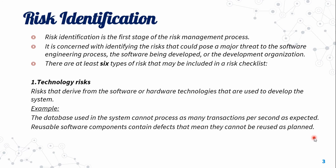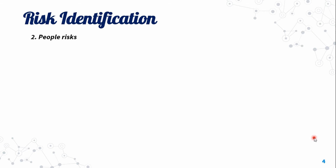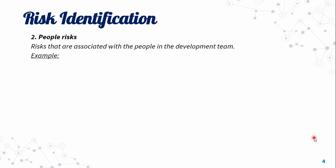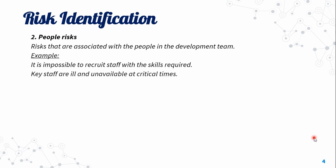Another technology risk example: reusable software components contain defects that mean they cannot be used as planned. Then there are people risks — risks that are associated with the people in the development team. For example, it is impossible to recruit staff with the skills required, key staff are ill and unavailable at critical times, or required training for staff is not available.